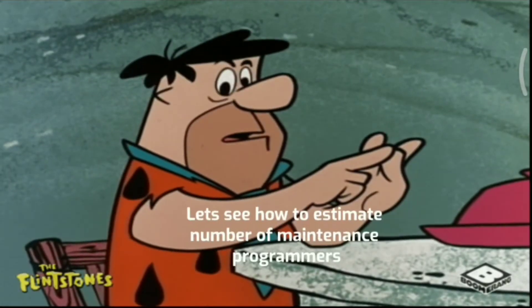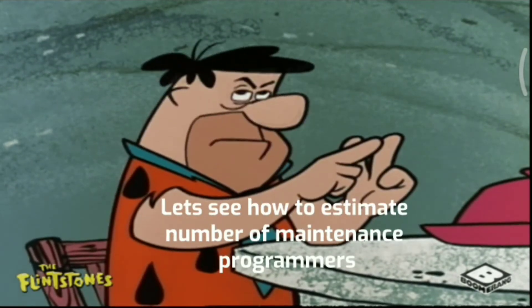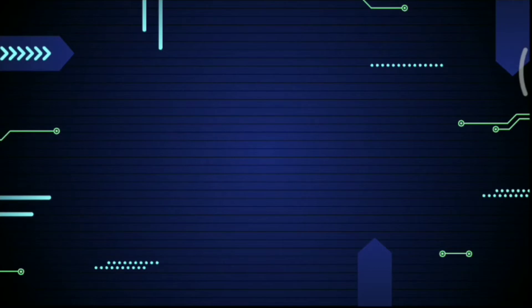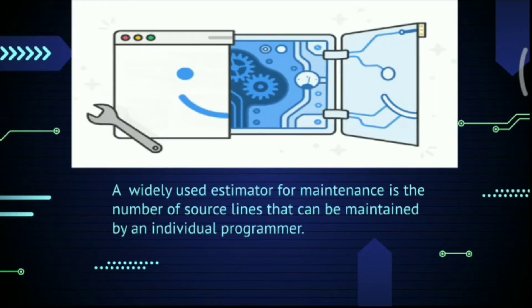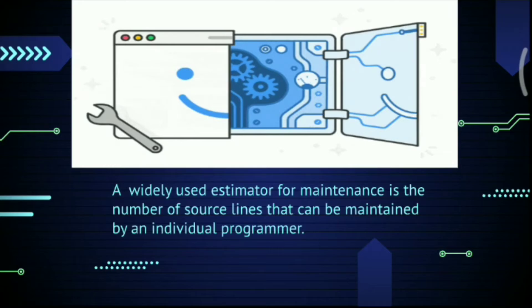Now let's see how to estimate the number of maintenance programmers. A widely used estimator for maintenance is the number of source lines that can be maintained by an individual programmer. An estimate of the number of full-time software personnel needed for maintenance can be determined by dividing the estimated number of source instructions to be maintained by the estimated number of instructions that can be maintained by a maintenance programmer.